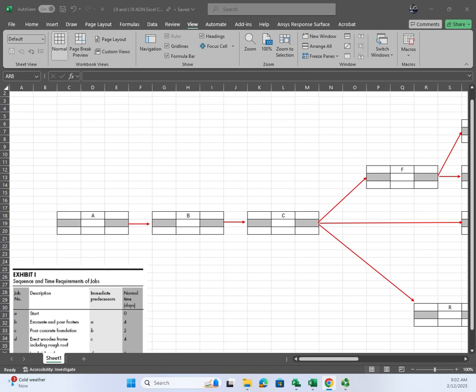If you look at it, when we start over here, our very first early start is 0. You can't start any sooner than 0. Can't say -1. That means you got on the site sooner than you planned. If you did, your whole schedule just backs up a week. Well, in this case, we have an early finish of 5. We think we can do this a little different than we can. I wouldn't have filled that in yet, but he did.